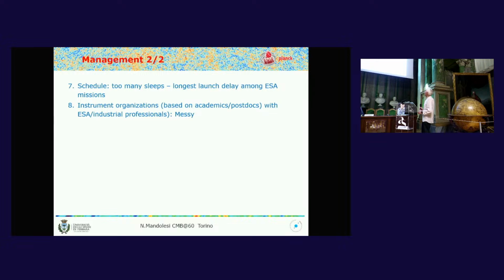Instrument organization was based on academics and postdocs together with industrial professionals. That was something which had to be adjusted. I think what we should do, as a lesson learned, is to train academic research personnel to talk the same language as industry engineers: evaluating and managing costs, risks, schedule changes.